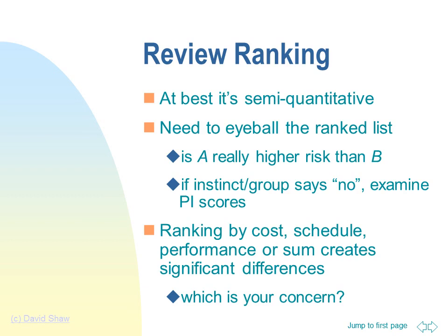Finally, you should use expert opinion to review the rankings. Remember that this is a semi-quantitative process. Review the ranked list to see if A is really a higher risk than B. If an expert review disagrees, change the ranking to reflect your concerns.